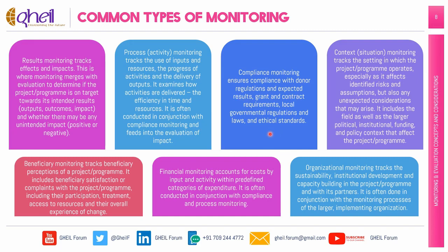Compliance monitoring ensures compliance with donor regulations and expected results, grant and contract requirements, local governmental regulations and laws, and ethical standards. For example, a shelter project may monitor that shelters adhere to agreed national and international safety standards in construction.